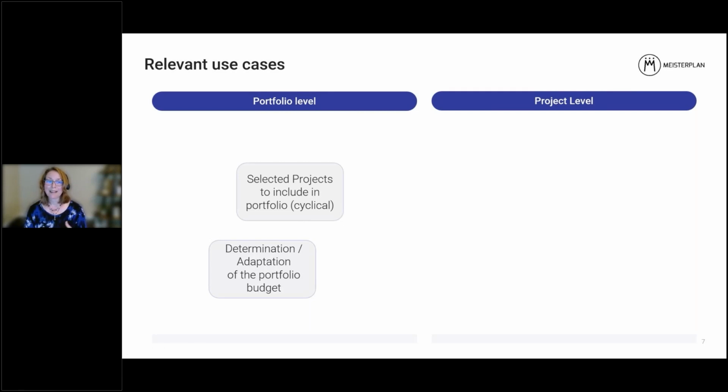What then happens is you go through your planning phase of selecting certain projects to include in that portfolio. This is the quarterly or annual cycle that you're going through, and we know that budget may not be exactly what you need, and that's why during this time period you're adapting the budget at a portfolio level, or really figuring out if those projects need the entire scope, or negotiating what could be done in order to align a more predictable starting point. Eventually, budgets are locked in on those projects and approved to be worked in the portfolio.